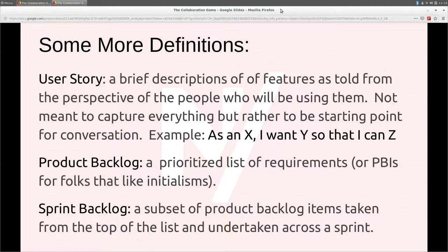Product backlog is a giant list of all the things you want to build over time. Usually ordered top to bottom by business value — prioritized by what you're going to take on first, what's going to give your organization, stakeholders, and customers the most immediate value, with more debatable things at the bottom of that list.